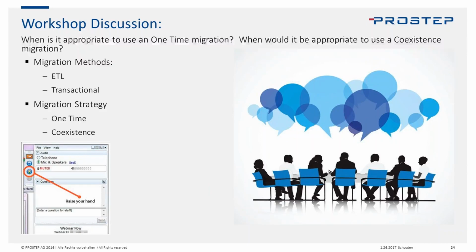And that's great for the checkbox, but this is another thing that sometimes might lend itself to considering an incremental migration. If you have a high number of users, start with a department of 10 users, and then let those 10 users train another 10 users. Or at least if you start in digestible chunks, they can start using the system immediately, as opposed to attending a 3-day workshop and forgetting it all by the time they get back to their desk.